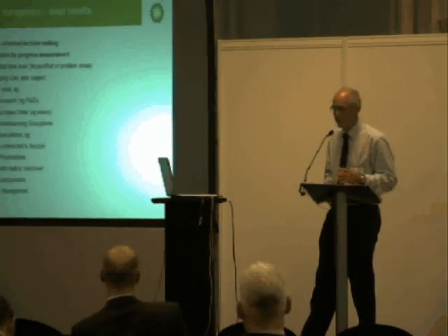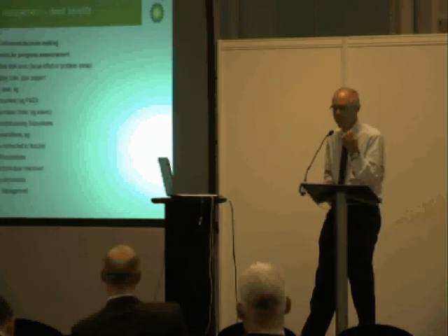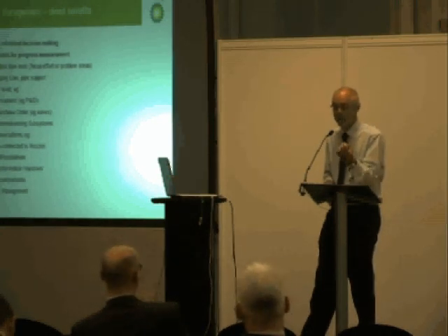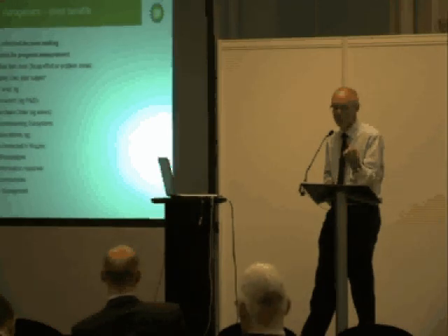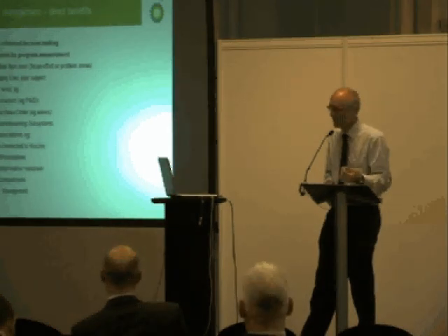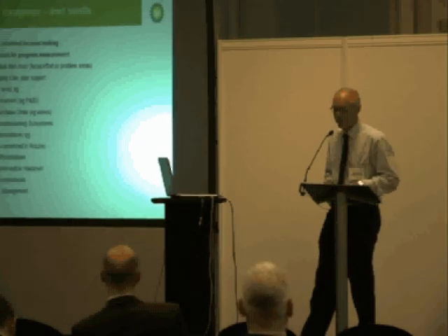And you can use this to help drive change management. You can firstly use it to help decide whether this thing requires change management. Is it mature enough? Have you shared it with somebody? If you've shared it with somebody, you've got to tell them about the change. And you can also use it to progress changes through a project. It's quite a powerful technique in that area.